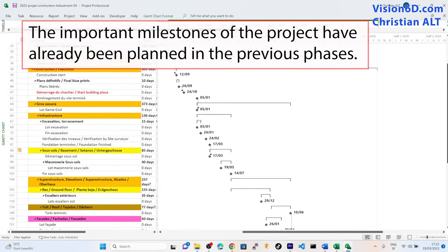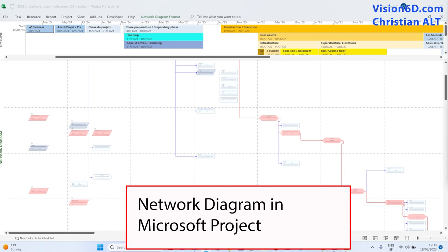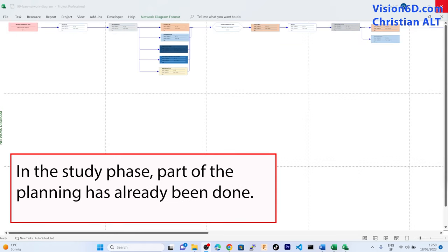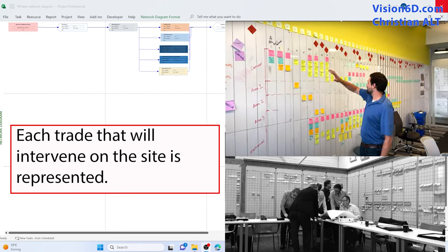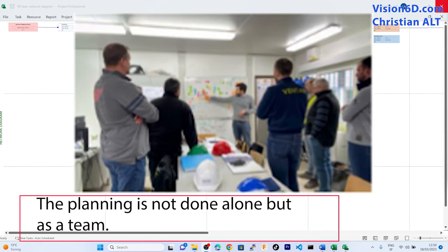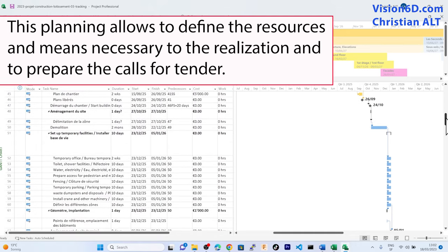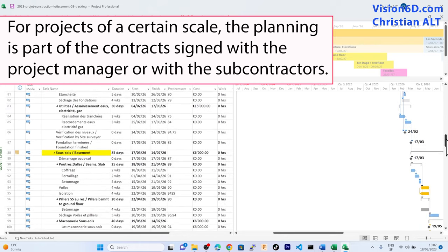The important milestones were already defined in previous phases. Then they resort to a more detailed planning by defining the logical chronology of the tasks, and for this we use the network diagram in Microsoft Project. More and more often, we resort to the use of lean planning methodology. In the study phase, part of the planning has already been done. It is carried out during planning workshops, where each trade that will intervene on the site is represented. This allows the specialists to be directly involved in the creation of the planning — the planning is not done alone, but as a team. This planning allows to define the resources and means necessary to the realization and to prepare the calls for tender. For projects of a certain scale, the planning is part of the contracts signed with the project manager or with the subcontractors.